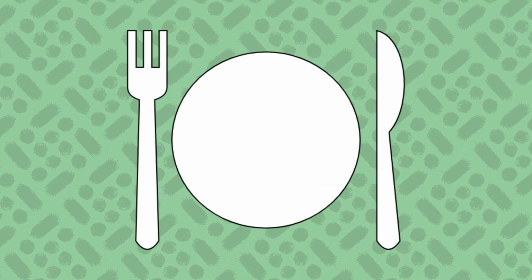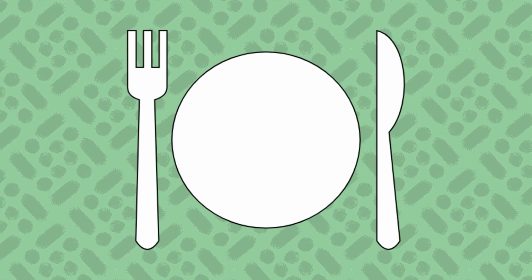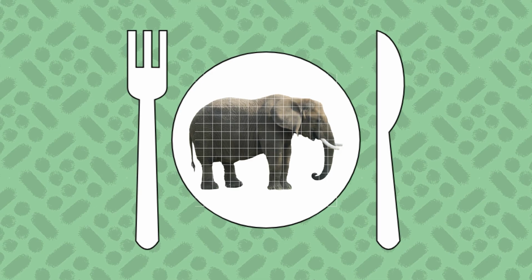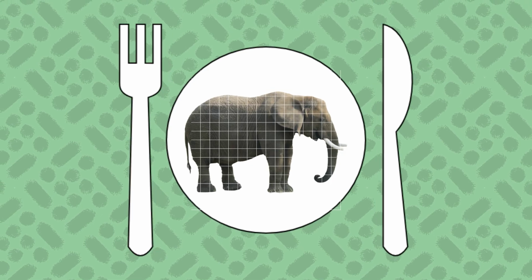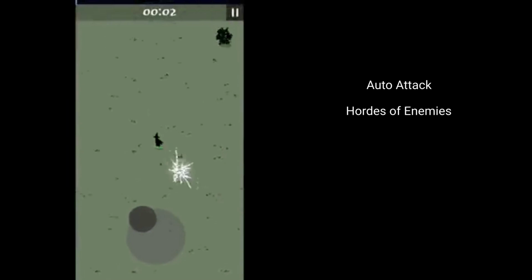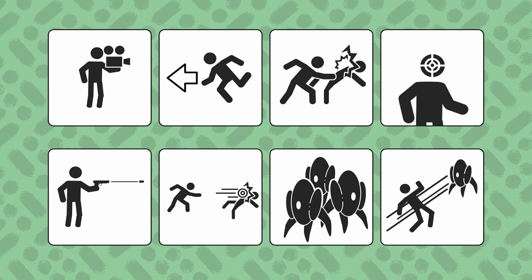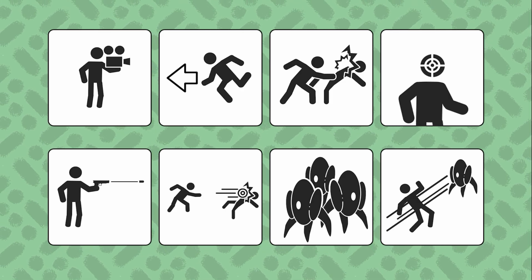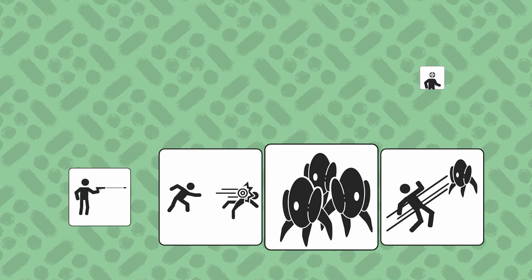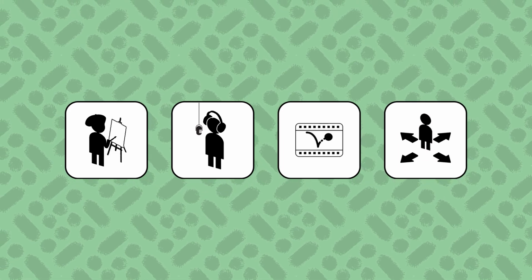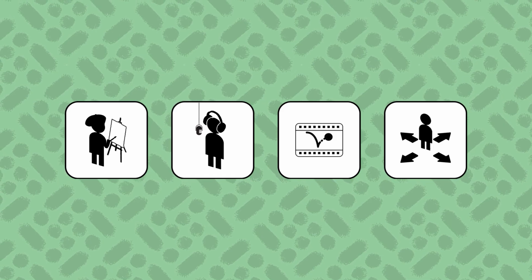developers. Building an entire game ourselves can be a bit like trying to eat an elephant. It seems like an impossible task, but if you take it one bite at a time, eventually it will get done. Much like how we created a step-by-step list of tasks for building our prototype, we need to break down the vertical slice into individual bite-sized pieces that can each be easily accomplished in isolation. This can be used for every aspect of the game, not just writing code, like the creation of art, music, and sound assets, level design, writing, etc. Try to break down every task into its simplest form, ideally so that it may be completed in a single work session.